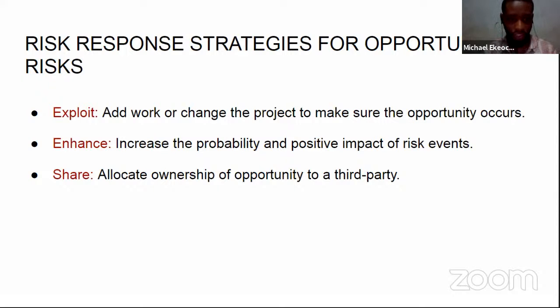Then the third one there is share, which is to allocate ownership of the opportunity to a third party. An example of this, I think, is partnership. You partner with somebody to take on a particular venture and then you share the benefits of that opportunity.